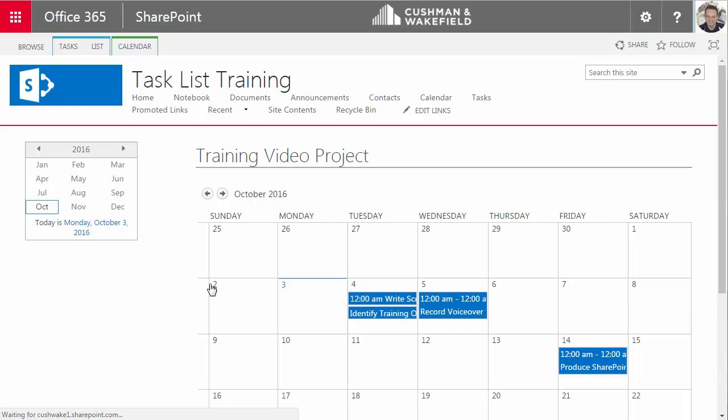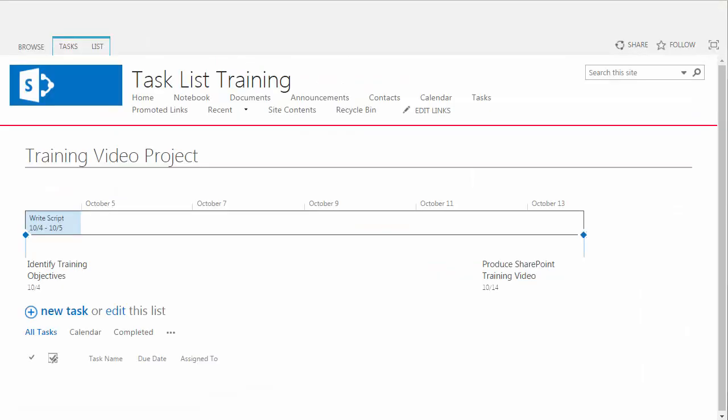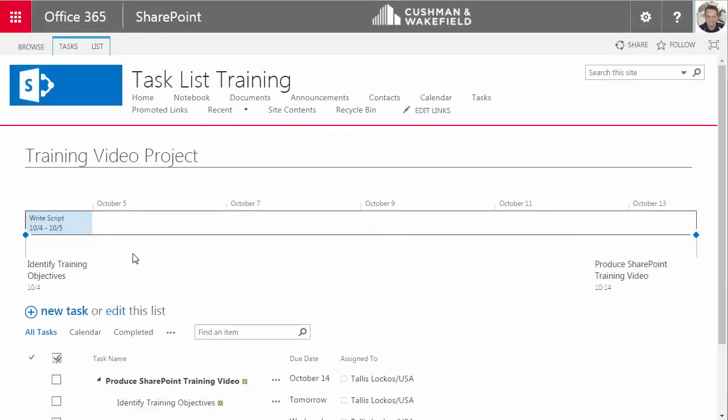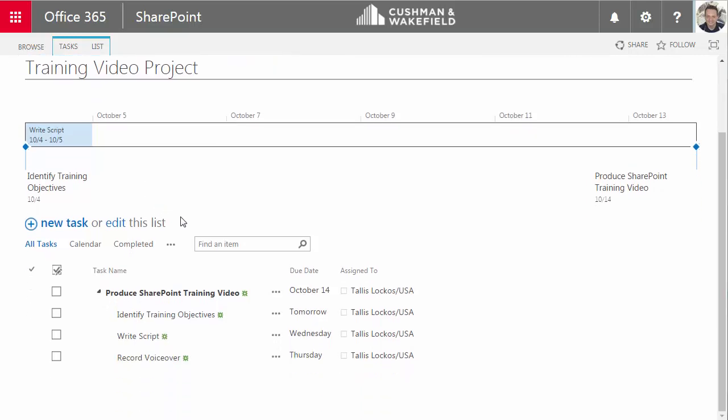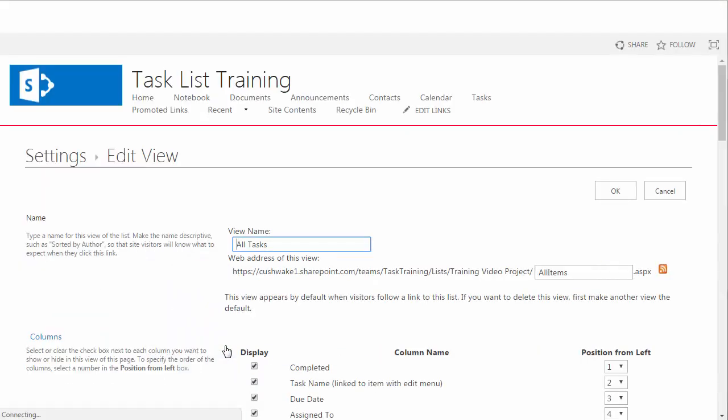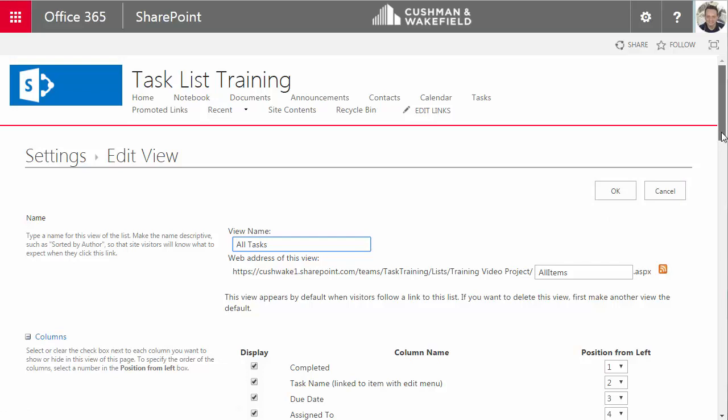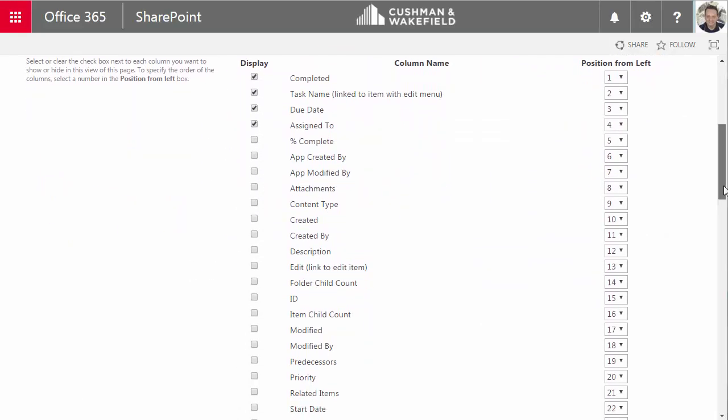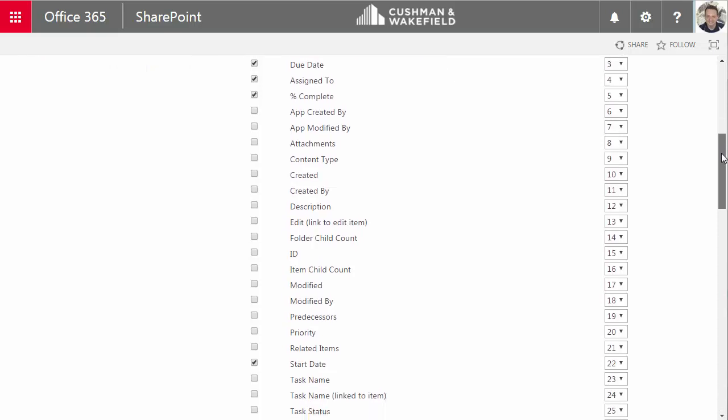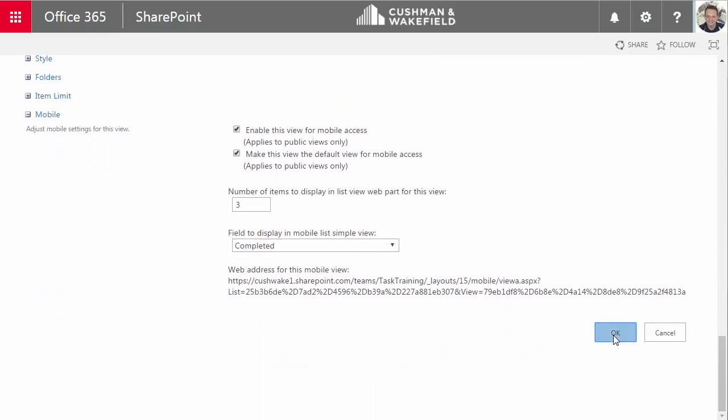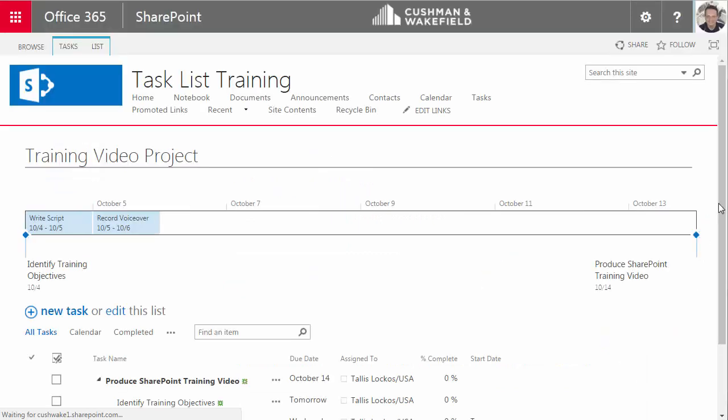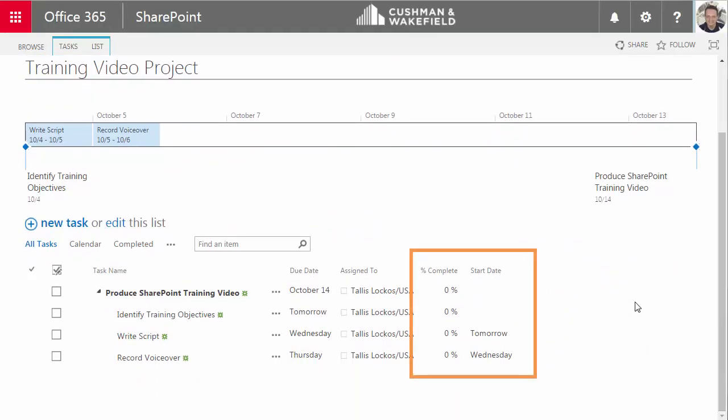I want to see the start date of these items in the All Tasks view. So while I'm in the All Tasks view, I'll click on the ellipsis to the right of the views and choose modify this view. And here I can see checkboxes of the data that I want to show on the task view. I want to add a start date column right here. You know what? I want to add a percent complete column too. So I check those items and then go to the very bottom of the screen and click on OK. And now I see the percent complete column and the start date column on my All Tasks view. And that's how you add items to a view.